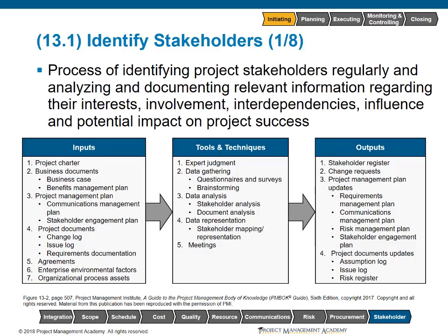Identify stakeholders is the process of identifying project stakeholders regularly and analyzing and documenting relevant information regarding their interests, involvement, interdependencies, influence, and potential impact on project success. This process is performed periodically throughout the project as needed, but should be started as early as possible.